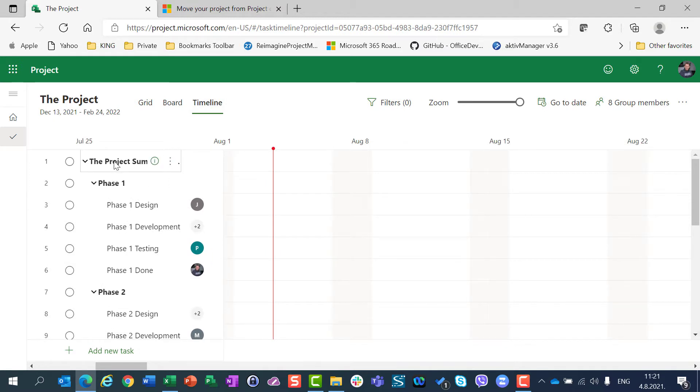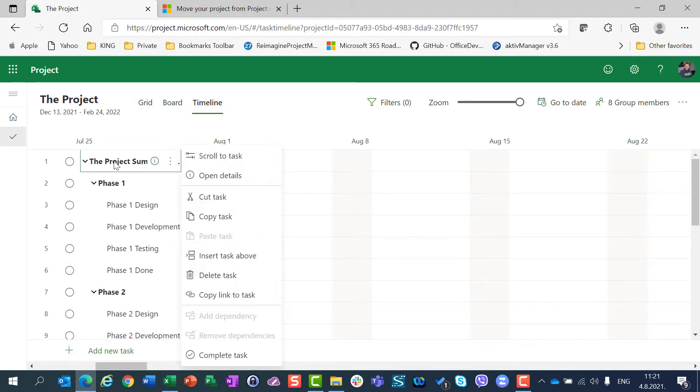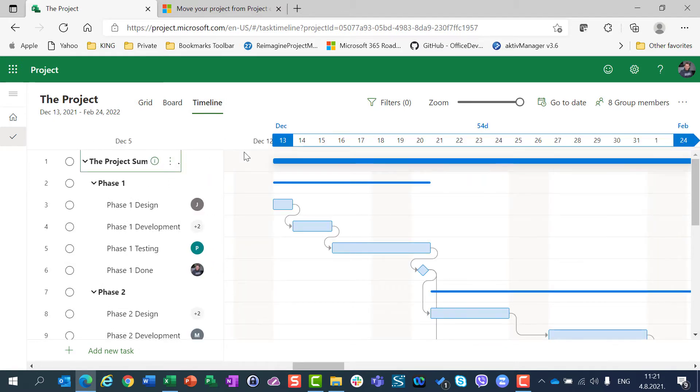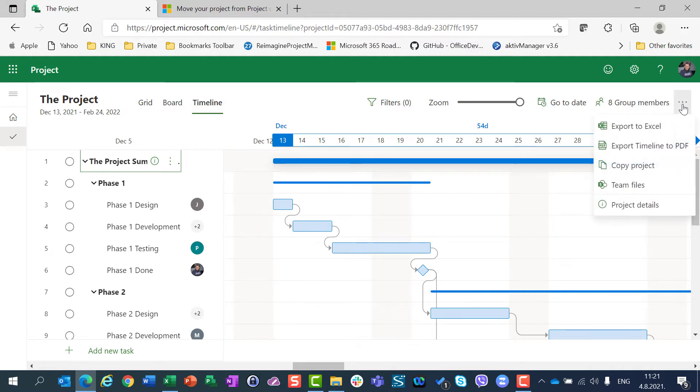So, first of all, you should jump to timeline view, and then when you are on timeline view, click on these three dots, more actions, and you can see export timeline to PDF.